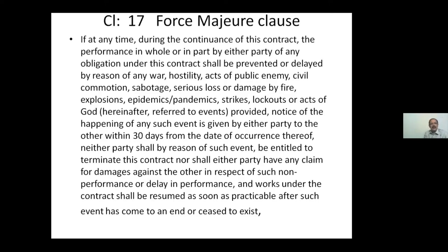In case of commotion, sabotage, war, hostility, or some epidemics, pandemics, strikes, lockouts, because of which the work cannot be done, there will be a complete standstill. Okay, so everything has come to a standstill. In that situation, this force majeure clause will be invoked. So for that, 30 days time will be notified from the date of occurrence.